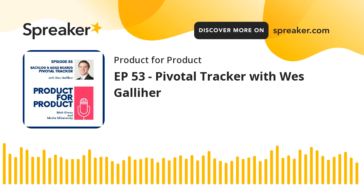And so one of the challenges, which we can get into later about Pivotal Tracker, is that the icebox can get very unwieldy. If you end up putting so much stuff in the icebox, it's hard to navigate to say, oh, what do we need to be working on next? That decision should be made elsewhere. So really the icebox should be very small, because the things that you want to work on in the next couple of sprints or so should be in the backlog manager like Pivotal Tracker, but then the rest should be in a product strategy tool to decide priority.